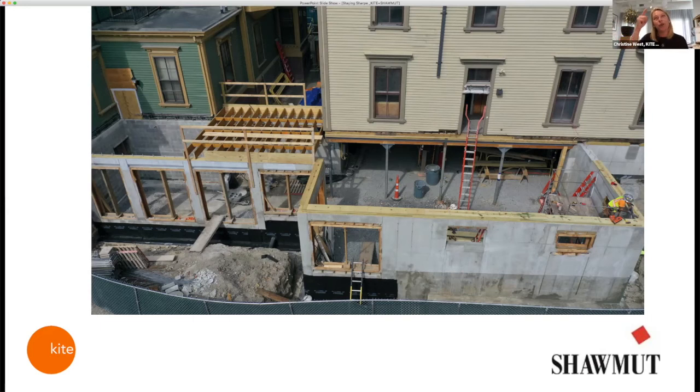And we said, you know what, when we connect that bridge to Peter Green, that's going to be a big problem. We're going to find stuff. We don't know what it is yet. There's going to be something. We don't know. And we got almost up to the end. They had set aside a pretty big sum of money to cover any risks. And we were almost connected.